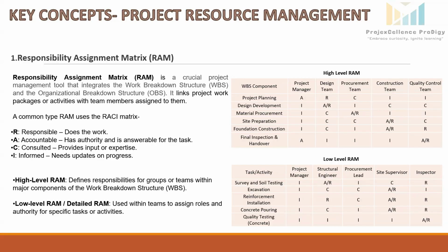RACI. R means responsible, who does the work. Let's suppose we have one project of house construction. So the person or team who performs the work, like construction workers, they are responsible for laying bricks, installing roofing, and completing other hands-on tasks.